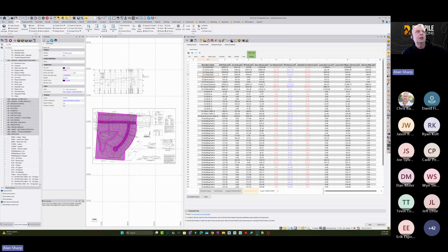There'll be totals for the whole site, total by phase, and then total of all the individual areas within each phase. So you'll get like phase 1, building 1, 2, 3, 4, 5, 6, 7, 8, 9, 10, 11, and then remaining area and the total area. And then you get the second phase for all the buildings, and then the third phase for the pond, and then the fourth phase for the right of way. And it will be broken into 4 groups.